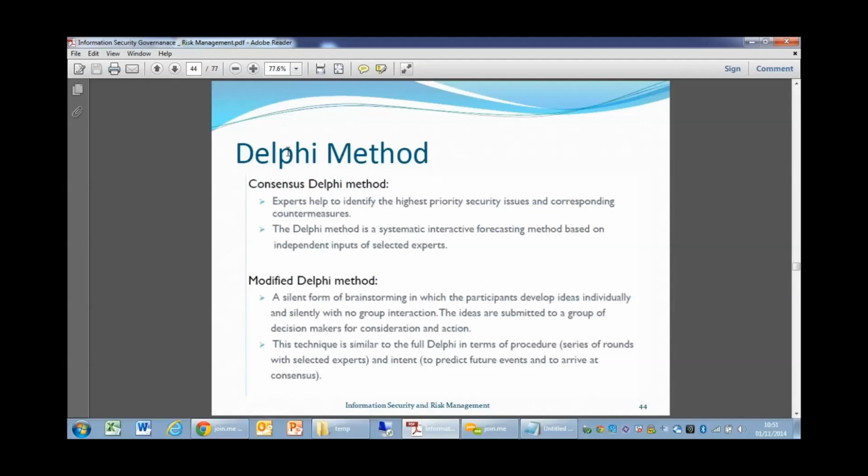And similarly, in this manner, you will come to a conclusion where you will be able to understand what reputation is or how important it is. So what could be the prime risk to the reputation? So this is a Delphi method. It is all about a people-driven approach, a questionnaire-driven approach, and there is one moderator who keeps on refining the responses received as part of the questionnaires, and then a new questionnaire is developed.